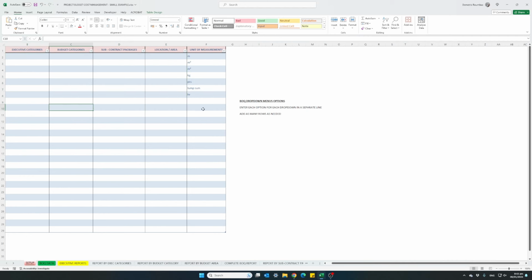Let's say we're not sure how this work will finish up, and we need to add a contingency just to be on the safe side. I will add a 5% contingency. This again will be added to the total: agreement plus variation plus contingency.